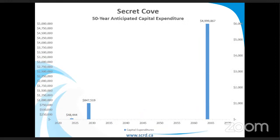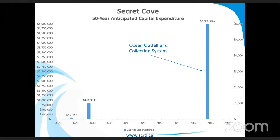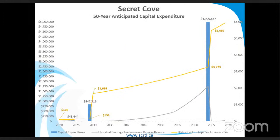If we back that window out to a 50-year window, we see a pretty large cost coming up. This is an ocean outfall — it's the collection system for the Secret Cove wastewater service area. I believe that ocean outfall cost is anticipated to be shared with Jolly Roger. If we go along the historical rates, continuing at a 2% increase, we still see a large jump in anticipated fees coming up in 2065. These sort of jumps are considered inequitable to future rate payers as they bear the majority of the costs in the debt.